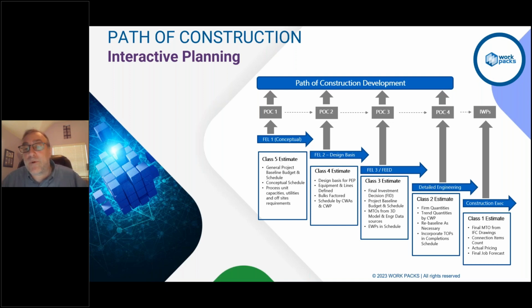And then as you go forward and get down to the class 2, you're reiterating and rebaselining and really making sure that you're linking together all the schedules here, particularly involving our friends in commissioning, the completions, commissioning and startup aspects of that, and looking at it from the system perspective and making sure it's linked in with the system's completion schedule, right? And then you go to the field.